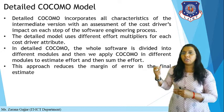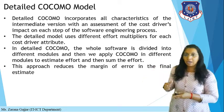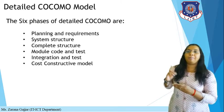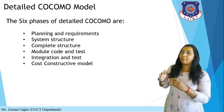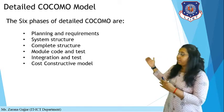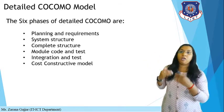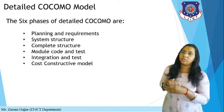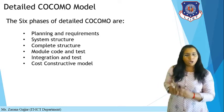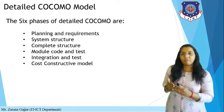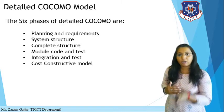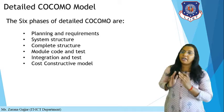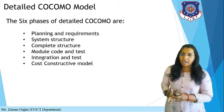This approach reduces the margin of error in the final estimate. The six phases for detailed COCOMO are: planning and requirement, system design, complete design, module code and test, integration and test, and the constructive cost model phase. All 15 parameters are applied in each phase and each module, and then the grand total cost estimation is calculated.